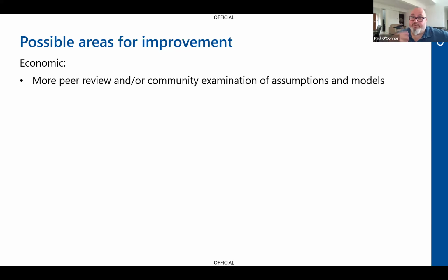The next part is deception, where he feels that the numbers that are put to decision makers are always the rosy numbers, the Goldilocks numbers, the one in the middle. And the risks are downplayed. And that's a little bit of a mixture of delusion, but it's also a bit of game playing to get the project started. And once that project started and the ministers signed off on it, it's very difficult for a minister to cancel, particularly an infrastructure project. There's a big hole in the ground. They're not going to wear that politically. So they have to then forge ahead and cough up more money to pay for the variations. So I think peer review will help to smoke a bit of that game playing out.